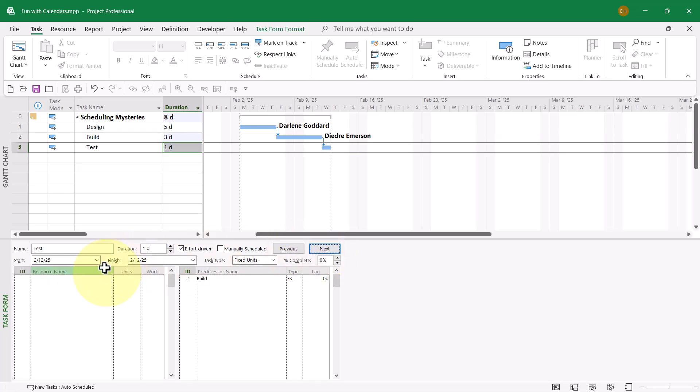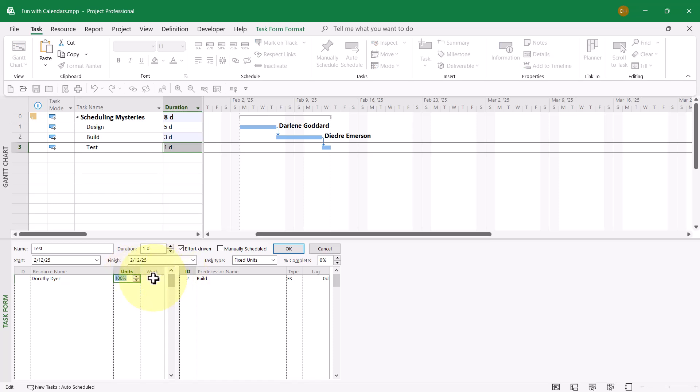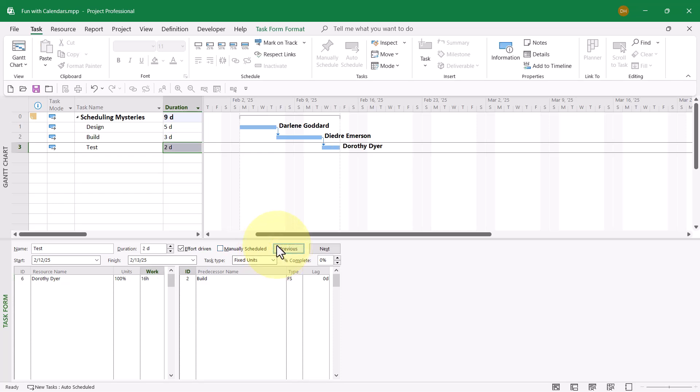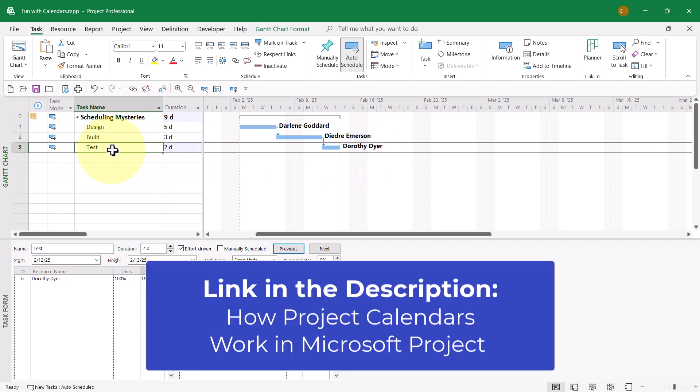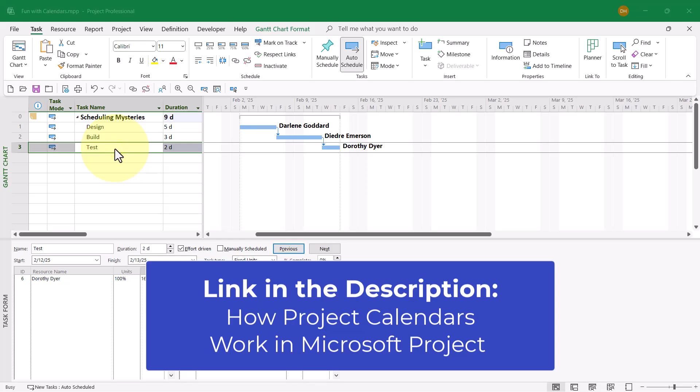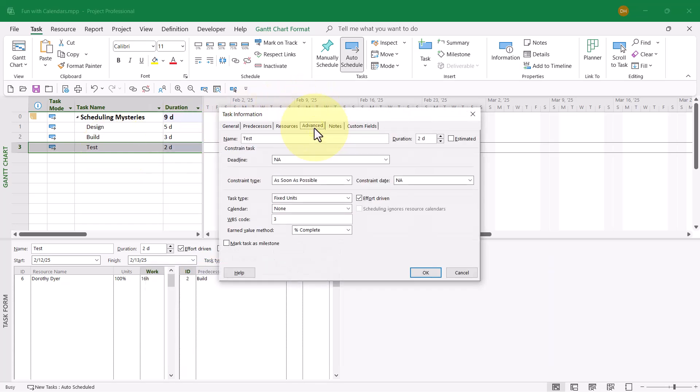I'll click Next, and on the task test, let's assign Dorothy Dyer to work full-time for 16 hours of work. That gives us a duration of two days. No mysteries there. But now I want to apply a task calendar to the test task, and I want to schedule this task to take place only on a weekend. From the previous video, you might remember I need to double-click the test task and go to the advanced page.